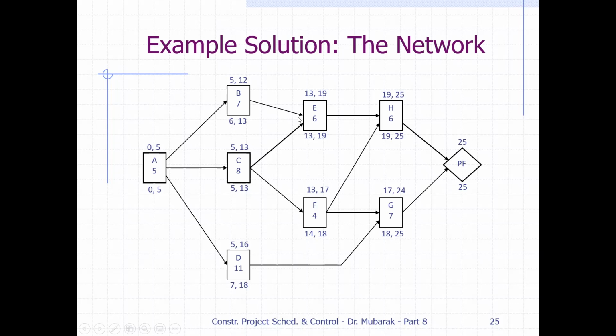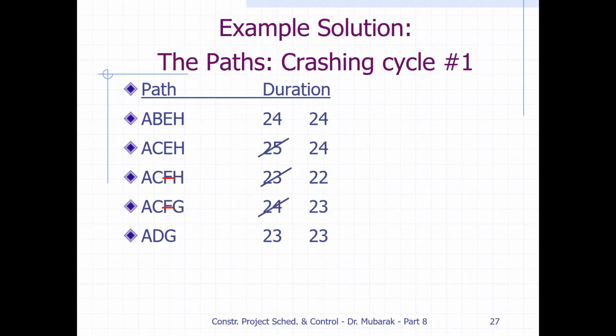Before, you have here 12, 18. Because we cut 1 day here, we put 12 and cut 1 day, so it will be 12 plus 5, which is 17 here. Similarly, the other will be 17, and 20 plus 6 is 23. So the duration, instead of 24, will become 23 in cycle 2. This is the way it goes, after one cycle, the duration looks like this.